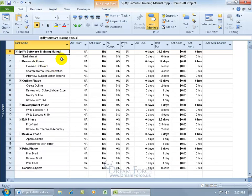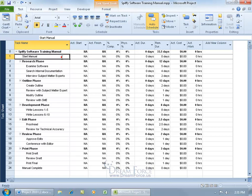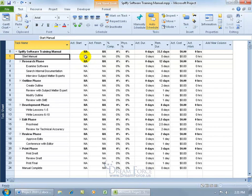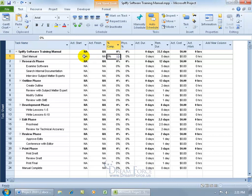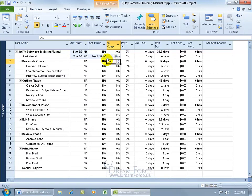Now, in all simplicity, when you want to enter in a progress of a task, like 50%, 75%, or 100%, like let's say for starting the training manual, if there hasn't been any changes to the actuals, like the actual start or finish dates, in other words, we're on target, we haven't started any earlier or any later, you don't have to enter in the plan for the actuals here, because the plan will automatically be pulled in as the default for the actuals if you put in the percent. That way you don't have to type it in, you don't have to do it for both fields, you just do it for one field, and it automatically pulls in the plan. 100, hit enter, and there you go. The plan was August 31st for starting the manual. And you can see that whatever cell that you change, if it affects other cells or updates them, it'll highlight it.